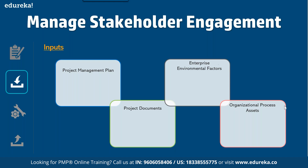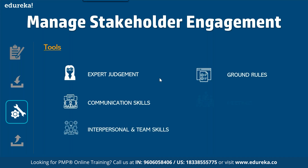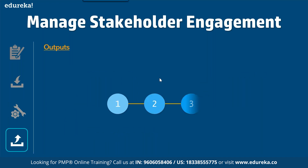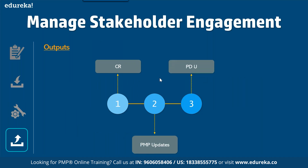The tools for manage stakeholder engagement are similar to those we've seen before: expert judgment, communication skills, ground rules, and meetings. The outputs are three: first is change request, second is project management plan updates, and third is project document updates.